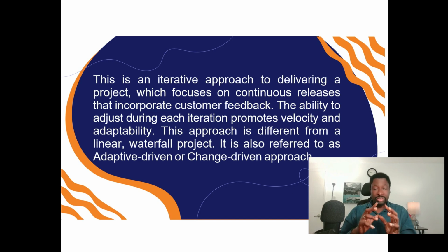Remember, during the waterfall, I said for us to accept any change, we have to pass through the change management process. That means we have to go through the change control board. They either approve our change or they reject it. And how do we do it? We have to create what is called a change request form.